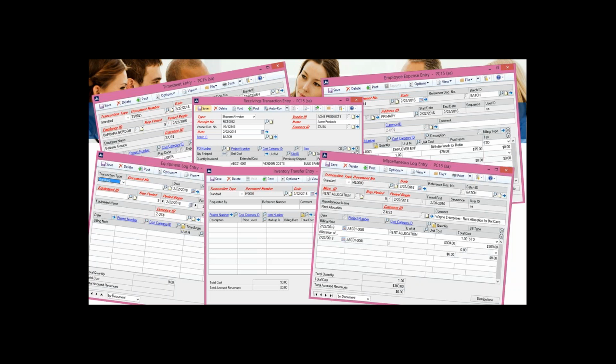I have seen other clients who use this for corporate overhead. They don't necessarily want managers and their executives to post time against their projects, but they want the projects to record a piece of the cost of having those people overseeing the process.